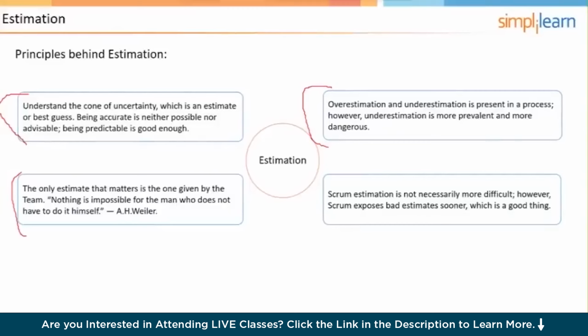And by looking at our velocity from iteration or sprint to sprint, there could be some information that is showing us that we're underestimating, for example, meaning we're thinking the user stories are smaller than they are, and that we can get a certain number done in a sprint, and then there's a fail. Well, that would be discussed during the retrospective, and then we would do something different going forward, which might include doing some re-estimating.